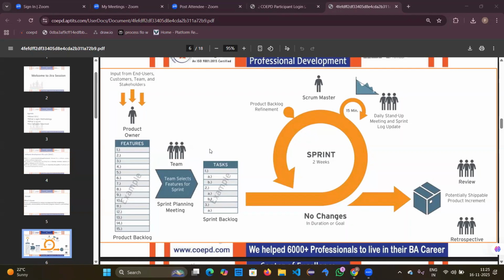Okay, so who are the stakeholders involved in this whole project? They will also be there in this product vision document. It is just like an official document, right? Okay, so this is the main purpose of this product vision document. Once it is prepared, we will take a sign-off from the client, so that he can verify whether all the things he has mentioned are there or not. Then once the sign-off is taken, the next stage can be started.